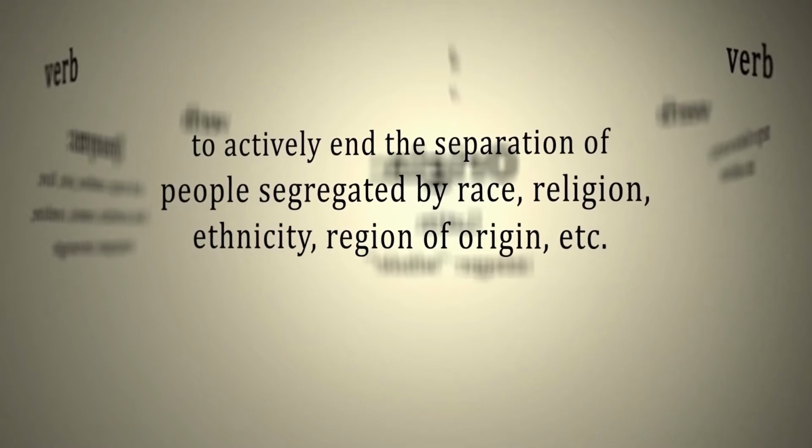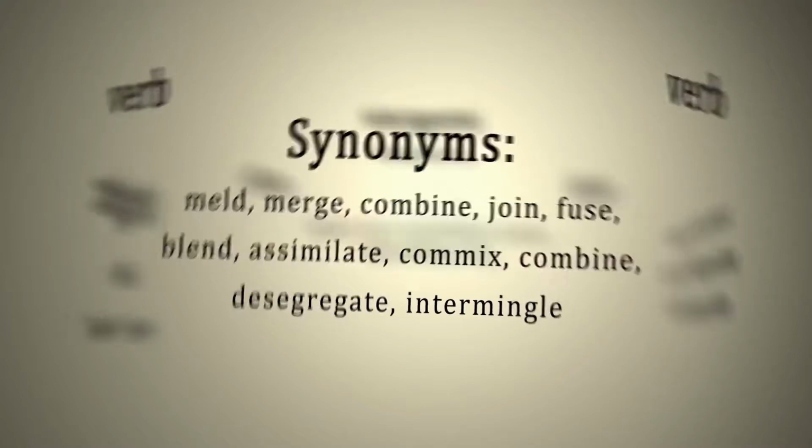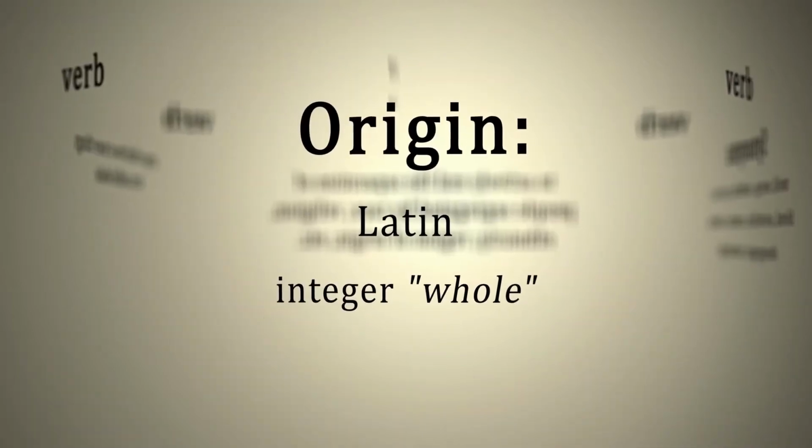If some data will be bundled together in a single push or pull, this can be one interface. But if you don't know yet, you're better off to list them all. If you don't even have a high-level plan of which data points are going to be integrated, then you probably need to take a step back and get some basics down and parameters for your project. Otherwise, your requirements, design, and implementation phases may run rampant with scope creep.